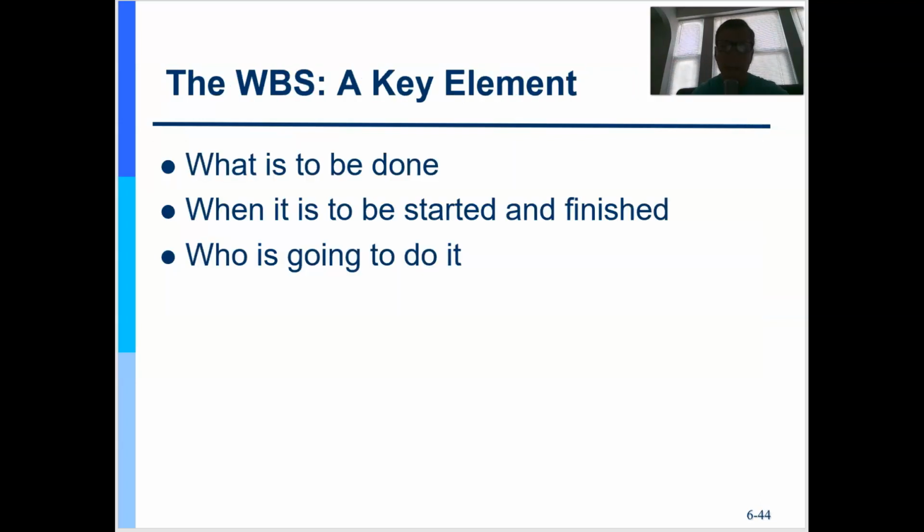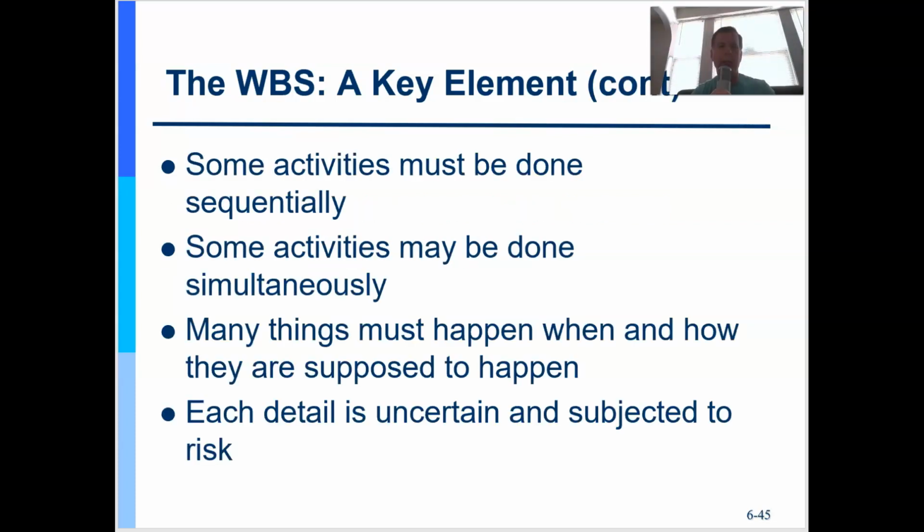Very powerful tool. I already mentioned the work breakdown structure, another super powerful tool, and also a team building tool. It will define the scope. If it's not in the work breakdown structure, it is not in your project. It's what has to be done from start to finish. Scope creep happens when people add things, and I would go back as a project manager. If a stakeholder wants to add something, I would look at the work breakdown structure with them and I'd say, where does it fit in? Because if it's not in the work breakdown structure, it's not in my project.